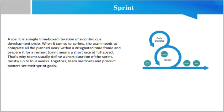Team members and product owners set their sprint goals, and as soon as this race starts, the team works tirelessly to finish the planned work and prepare it for a review. Sprint planning is the beginning of the sprint process. The development team, scrum master, and the product owner all participate during this stage. The scrum master will provide data on the team's most recent and average velocity during this meeting.